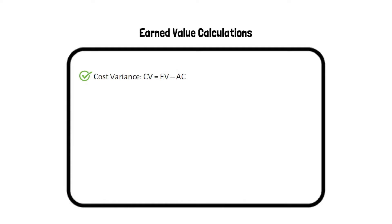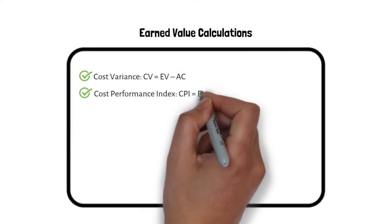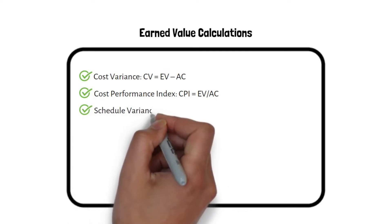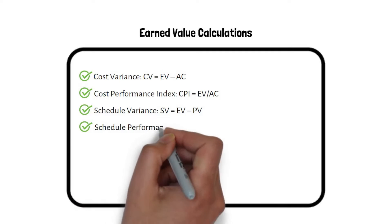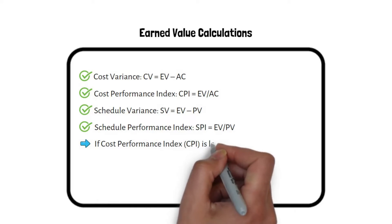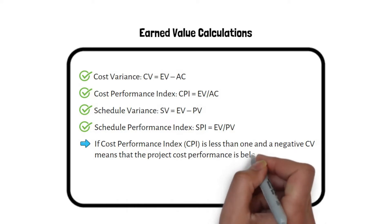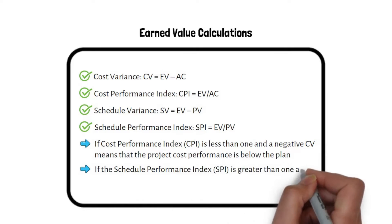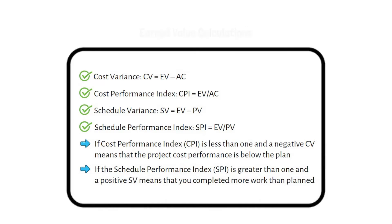Earned Value calculation formulas: Cost Variance (CV) equals EV minus AC. Cost Performance Index (CPI) equals EV divided by AC. If the Cost Performance Index is less than one and CV is negative, the project cost performance is below plan. If the Schedule Performance Index is greater than one and Schedule Variance is positive, it means you completed more work than planned.